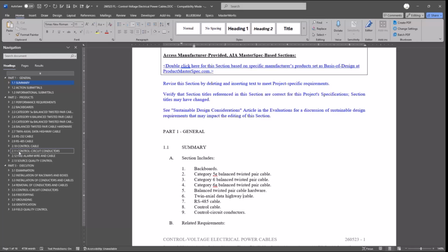And normally Newforma, or the program which you're talking about, is my preference. As much as I don't like them, it is much easier to go back and look at them legally in the court of law whenever things hit the fan. Of course, you sent me an email and then I responded, according to your email question dated something, you asked this question right here. My response via Newforma is this.